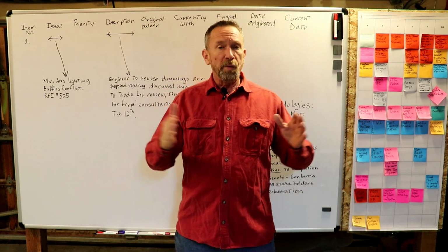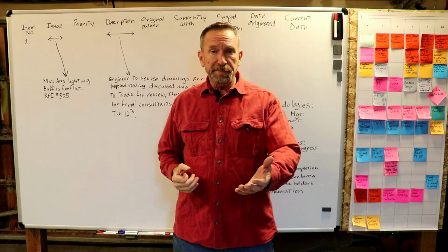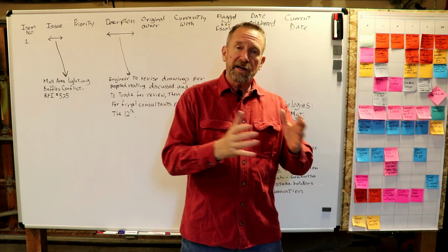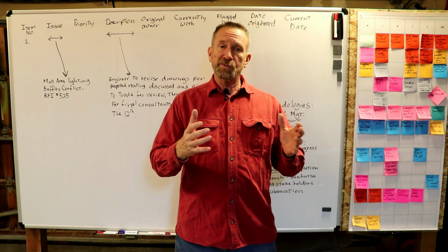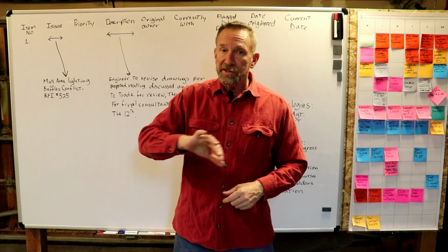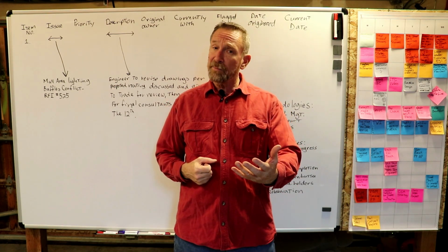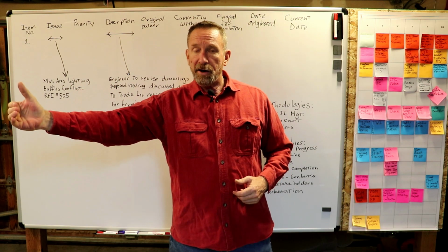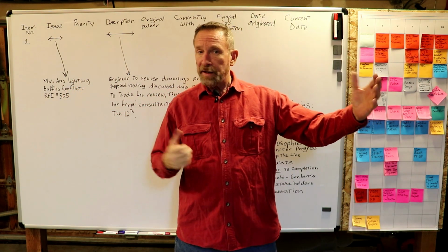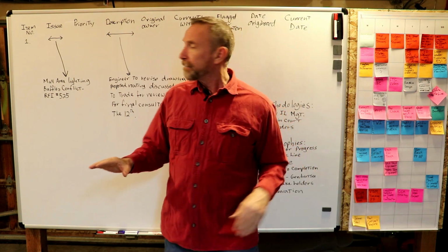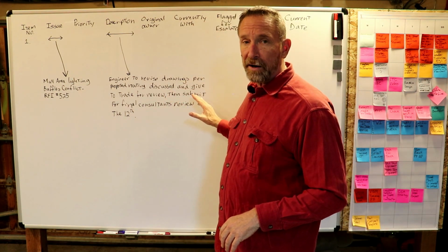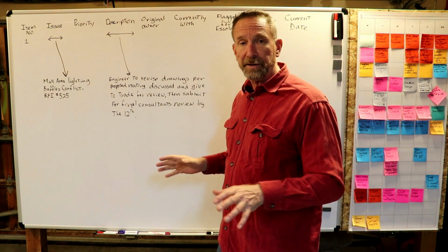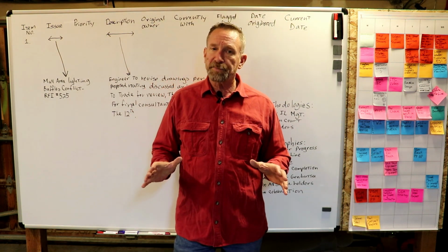As a team, we all need to know that you're tracking to get it done, and not to beat you up or to overmanage you, but to make sure that we have enough time to compensate if you're not. If you need more resources, we need to be able to free those resources up, get them to you so that you can get it done. And everybody's treated the same way, all the way from the owners and CEOs of the trades, contractor, architect, engineering firms, and the client. It doesn't matter who you are. Your position doesn't matter. If you are here on this log, then you are going to have someone contact you to make sure that you are tracking to get it complete. Okay? That's the key.